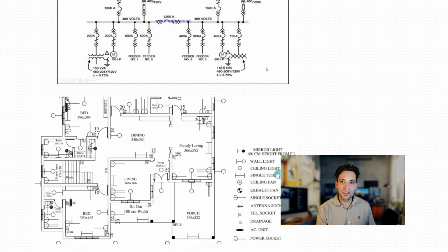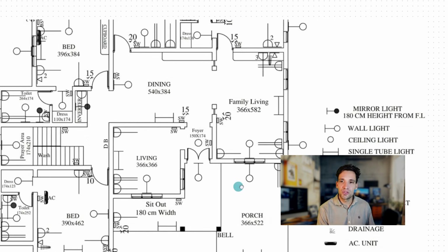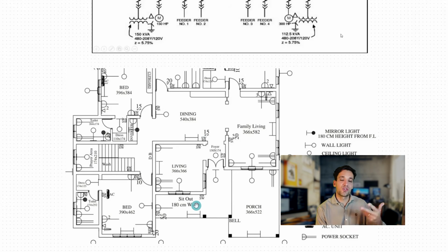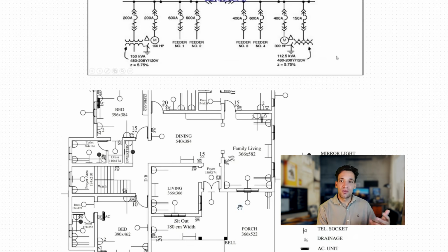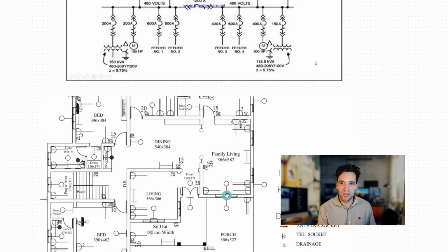When you're talking services as well, the actual layout drawings will show symbols to represent all of the different service components on the drawing. So you might have a certain symbol for a light fitting, for a switch, and the position of all these. Often you'll get a cable schedule or some sort of pipe schedule that supplements this, but you may have to measure that yourself. It really depends what information they are giving you.